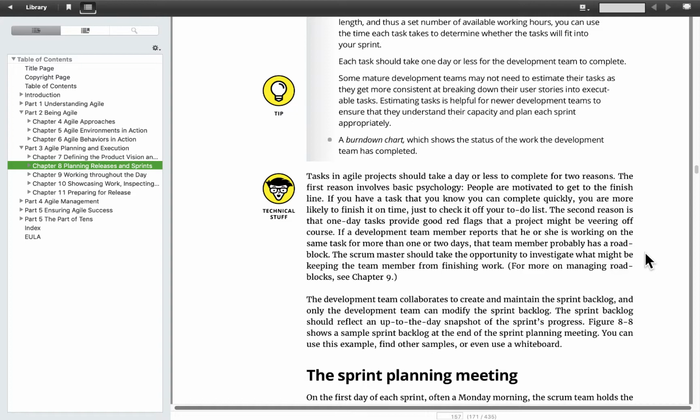What we really need to know, though, is how many points we're burning off in each of the sprints. So, for our purposes in my class, we can track things by points. Okay. You create this thing called a burn down chart, which we'll see in a minute, and that shows over the life of the sprint how many things we completed in what time frame, and of course we burn down the points in the sprint.